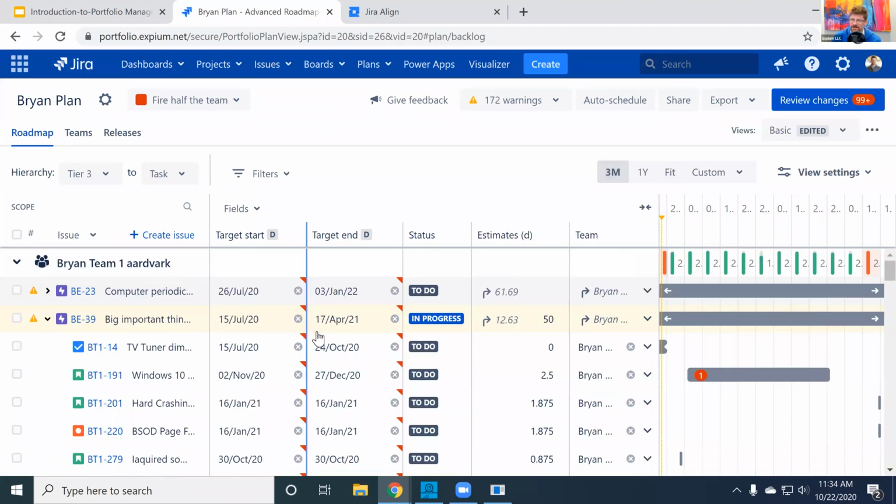In this situation, it's the same data, same views, but this time all the values that I'm changing are being saved under a different flag. And after we get together and talk about each of these scenarios, we can decide which scenario to push back to Jira after our management meeting. That's a lot of information about Portfolio, or about Advanced Roadmaps.